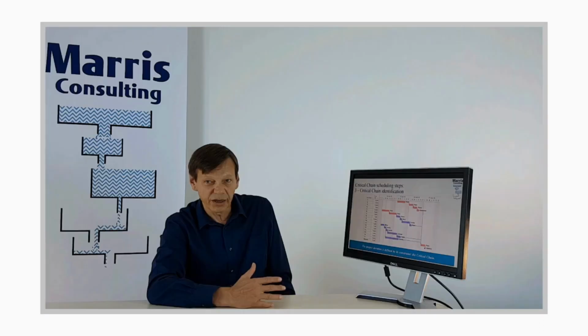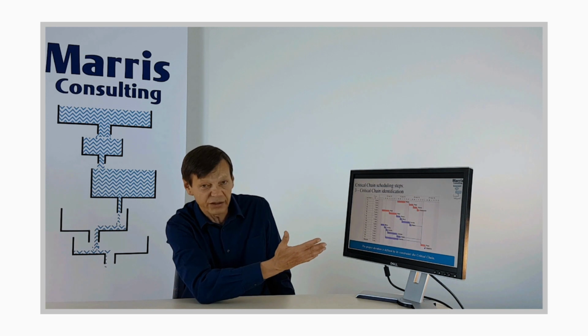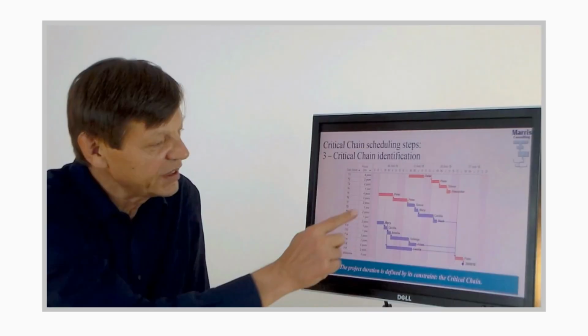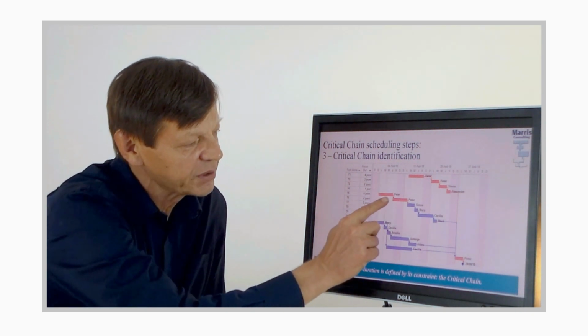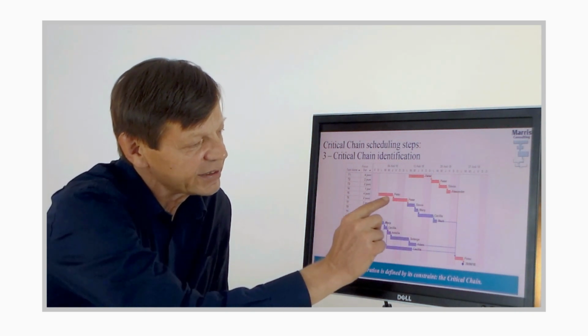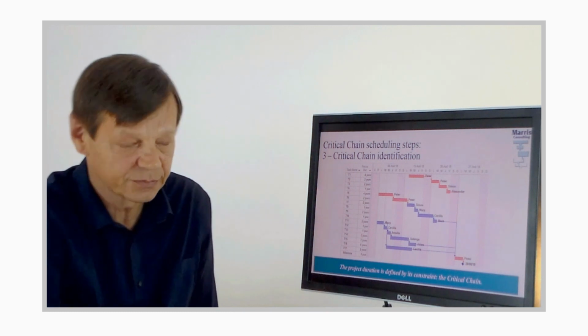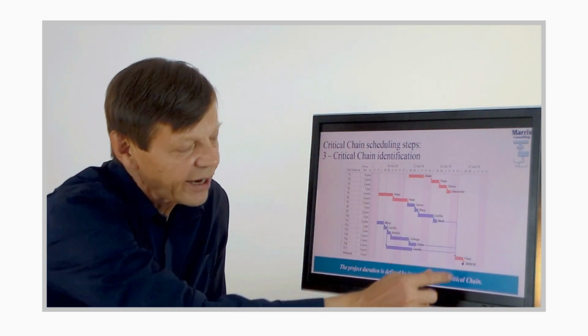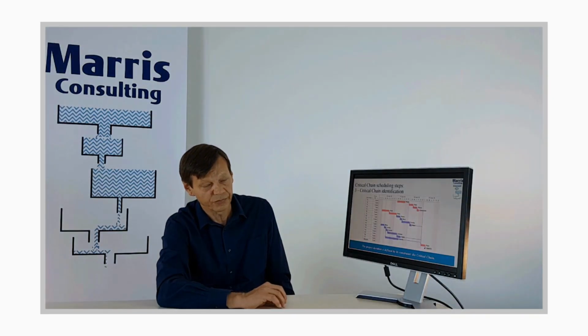that's good. But what's wrong with what we have here? Would you plan a project like that? You shouldn't, because these are focused durations, right? There's a 50% probability that they're going to take longer than that for each individual task, okay? So doing it this way, you'd be more or less guaranteed not to finish on time, okay?